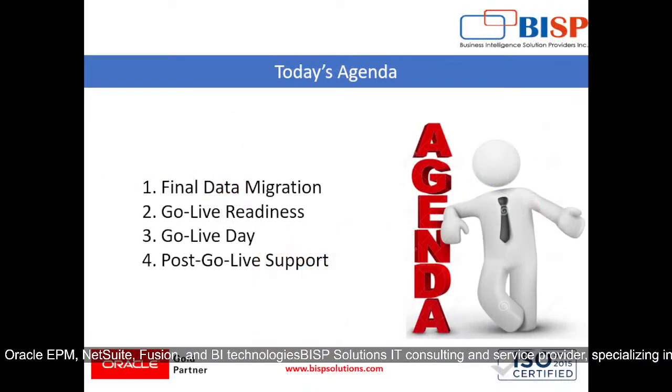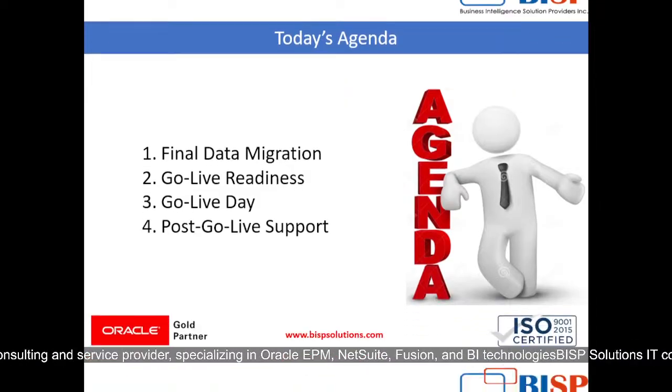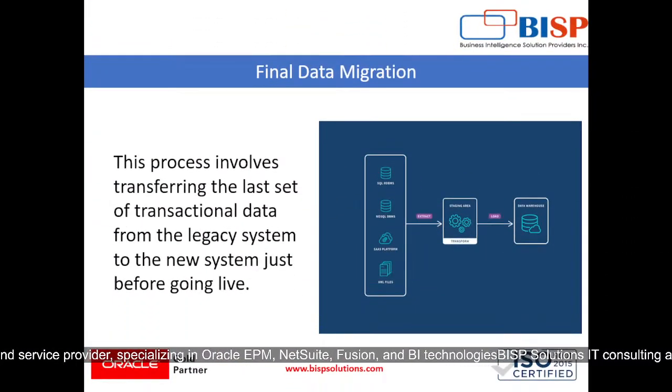So coming to today's agenda, which is final data migration, go live readiness, go live day and post go live support. Starting with our final data migration, this process involves transferring the last set of transactional data from the legacy system to the new system just before going live.